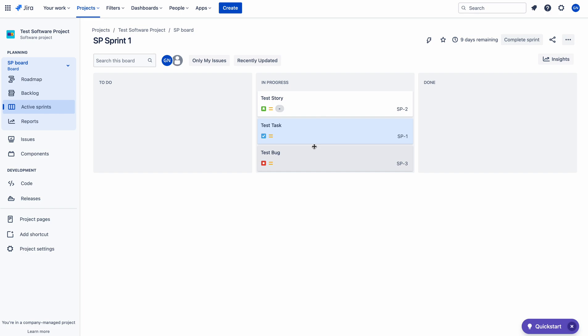So to rank issues, the filter query which was used to create the board must have 'ORDER BY ascending rank'.